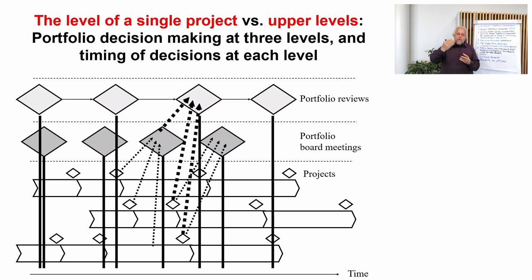that it is not only that the data is collected and then boards make the decisions, but it is rather important that in those board meetings, those managers and executives who are participating agree that certain members of the meeting go and discuss with the project managers that are involved by these portfolio decisions, and they explain why we made this kind of a decision. They provide the feedback from the upper management. In this way, we have a kind of organic organizational setting where there is not only one-way communication, but two-way communication, up and down between the subordinates and the managers.